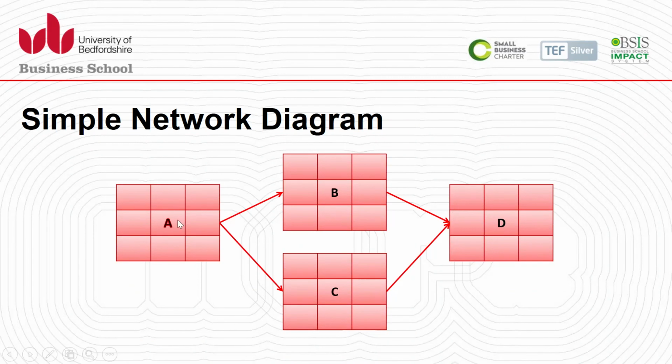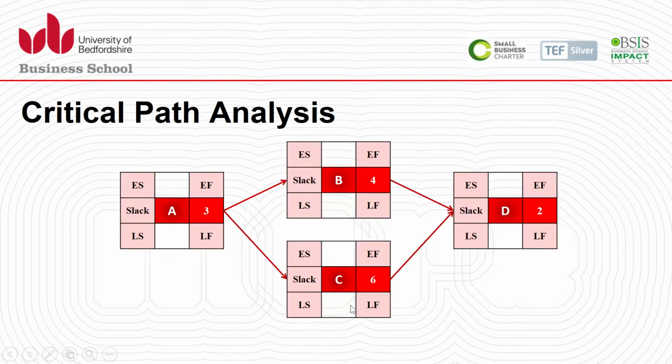A has to complete as the start of the project. B and C will start side by side soon after A, and D can only be started when both B and C are completed. So we can apply the same technique for each activity.